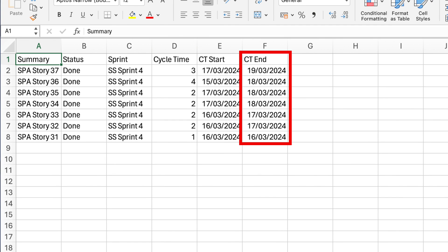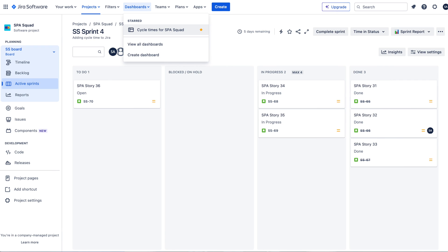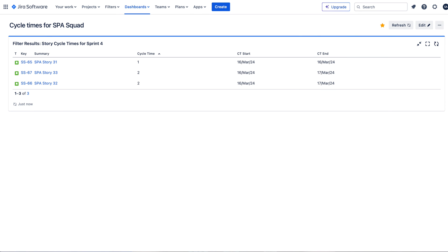Once you have your cycle time data, it also gives you the only data you need to run Monte Carlo simulation throughput. This is your throughput here — it's your cycle time end date. The end date tells you that you've completed a story on this date, so all you would need to do is add up the number of stories completed on the same date and enumerate that in a date list, remembering to put a zero in for any date where you didn't complete a story. To find out how to run Monte Carlo simulation with a free Excel template, check the description and the videos below. Since this data is now available and visible in Jira, you could also build some nice dashboards to display cycle time data within Jira itself. You could use this in your retro to analyze your throughput and cycle times or have it on a dashboard for stakeholders. If you're interested in that, let me know what you'd like to see and I'll do a video on it.